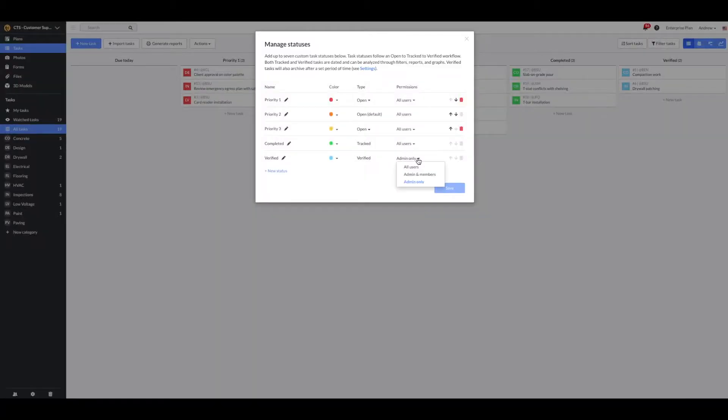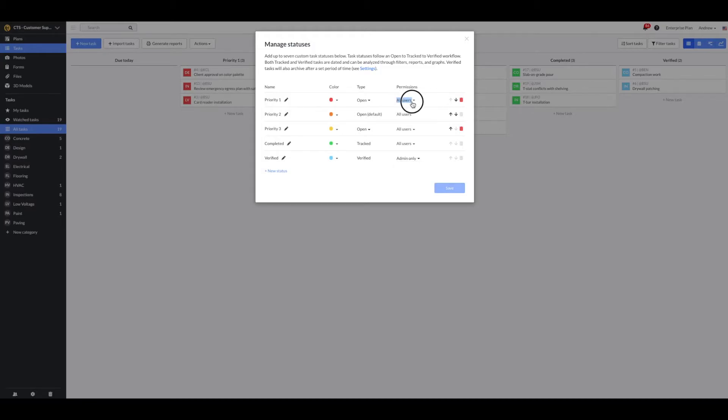Each task status can be associated with a project permission set, meaning you can determine which project permission set can move a task into and out of that status. You can adjust each status so it can be adjusted by all users, admins and members, and admins only.